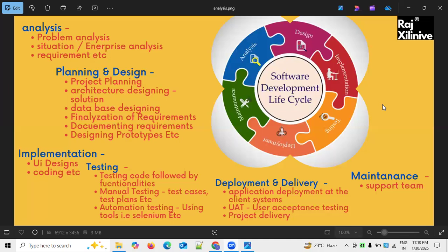So if you want to address the project, sometimes the customer will give you the case, as I told you. The customer will give the requirement, they'll give you the budget. This is our budget. So within that budget, can you do it? If you do, how are you going to do it, and provide your technical specification, project planning, what software you are going to use, what hardware, how much time it will take, how much manpower, what is your approach, everything, right? So we have to submit everything. They see, and finally they come up with one. They'll select one vendor. Normally, that is one way to do it.